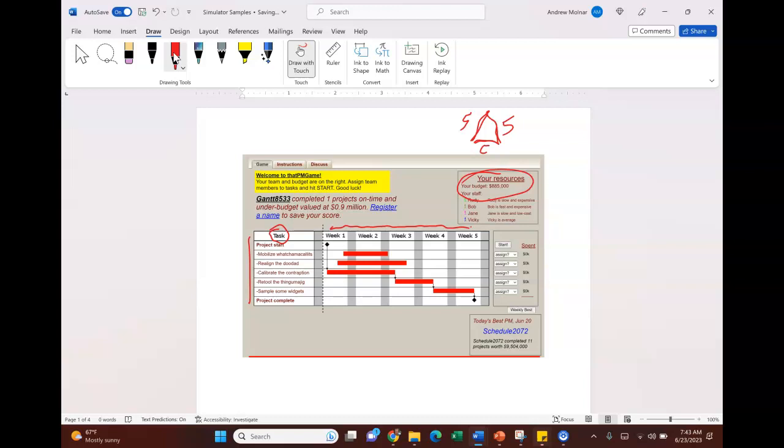But in general, early on, if I add people, I speed up my project. So resources matter. They also impact scope here on the left, right? Because the more skill they have, the easier, the faster, the more accurately they can complete their tasks, right? But people cost money, and the more skills you have, the more money.